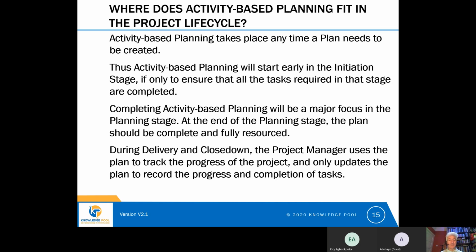Thus, activity-based planning will start early in the initiation stage, because one of the things that we need to do in the initiation stage is make sure that all of the tasks and all of the deliverables required in initiation are completed. So the project manager will normally create a small activity-based plan for the initiation stage to make sure that all the tasks required in that stage actually happen.